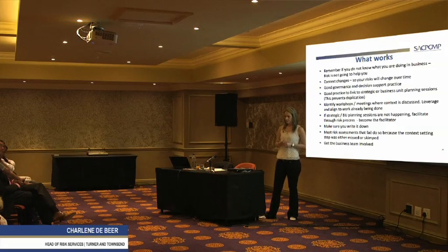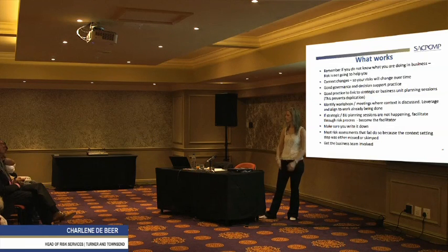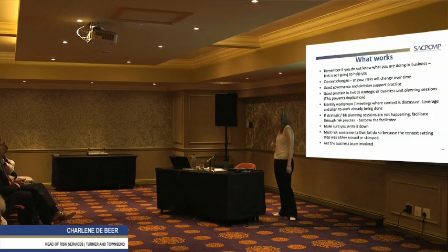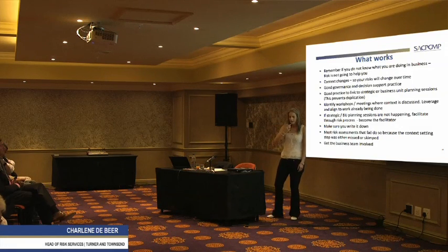It's just, if we make sure that this week we slipped 5 hours, the recovery Saturday we work 5 hours, done and dusted. Or they're maybe not as productive on a Saturday, so we need to work 8 hours to get the physical 5 hours. We can manage it as we go along. But a lot of people think risk is a stick.